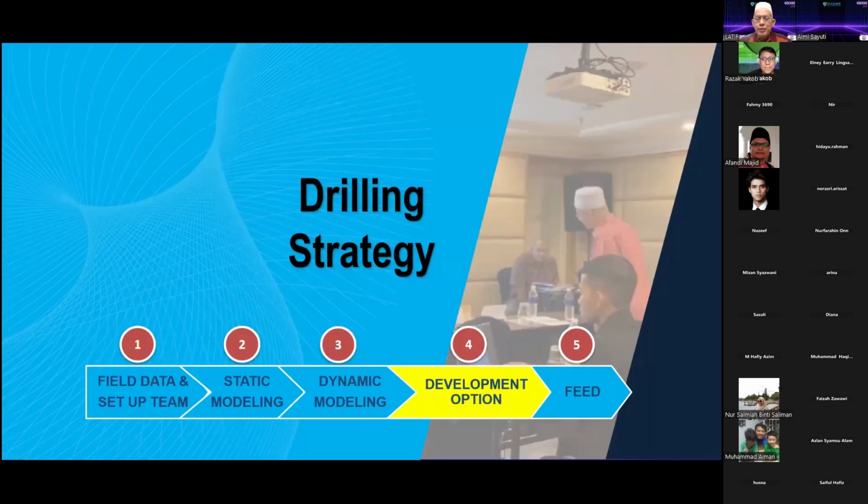So, drilling strategy. Once we have that, you must understand drilling contributes about 30 to 50% of the project cost. That's why drilling itself becomes so important, that you must have the right strategy, the right approach to drilling, to be able to reduce the well cost.